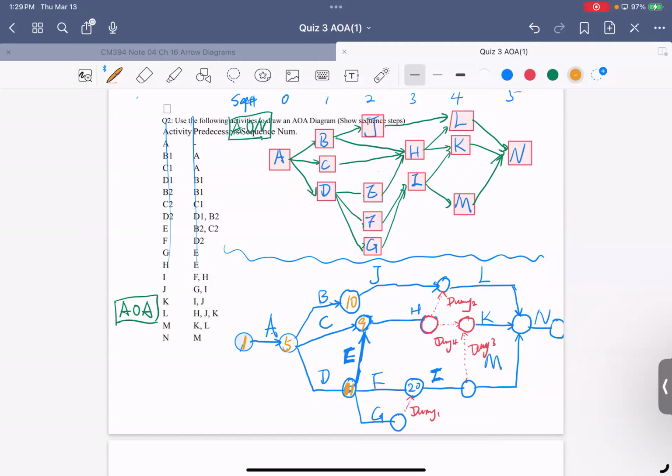You just need to make sure your left is always less than your right. But when you're looking here, you will see the E is pointing from 11 to 9. That's an issue. This is the starting of the E and this is the ending of the E. So this number should be 8, correct. So you will do 8 here.